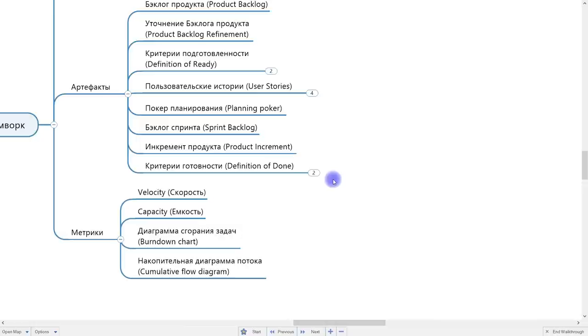And we multiply these 64 hours, for example, by the total number of developers in our team. And again, this helps us with our sprint planning. Again, we need to put different risks in here because, for example, we have a pandemic right now, so speed and capacity may depend on the fact that some team members may get sick. So we pay attention to that as well.